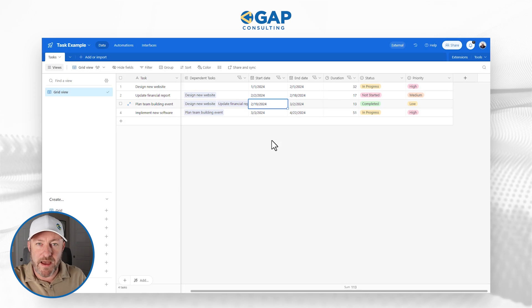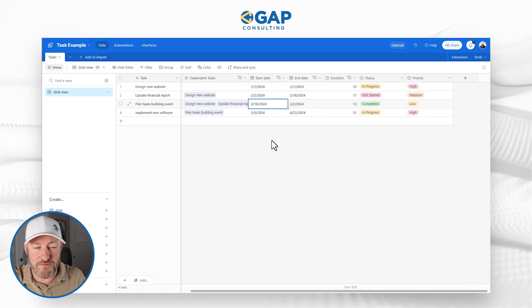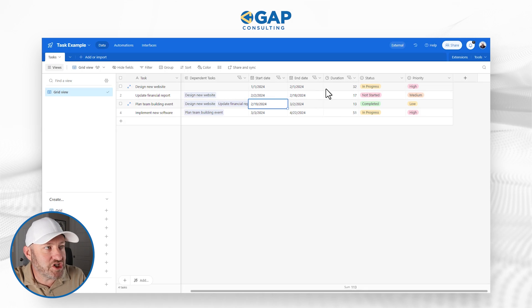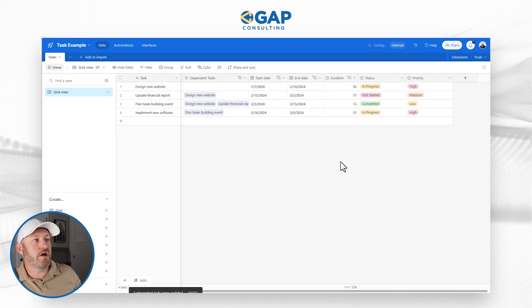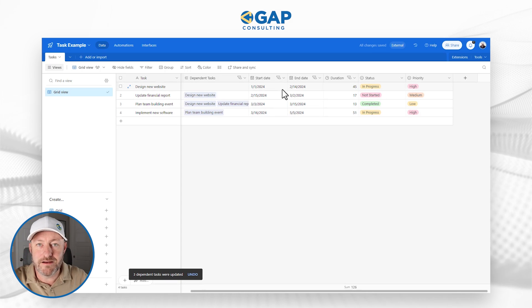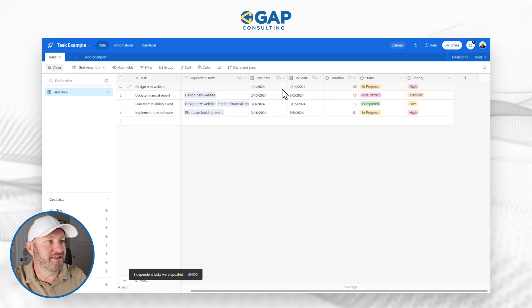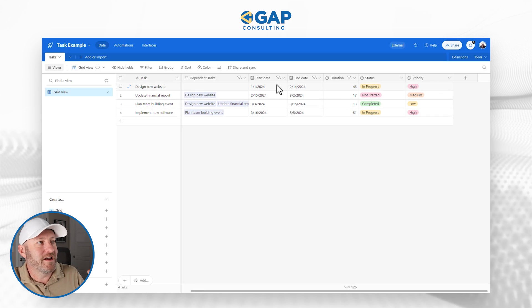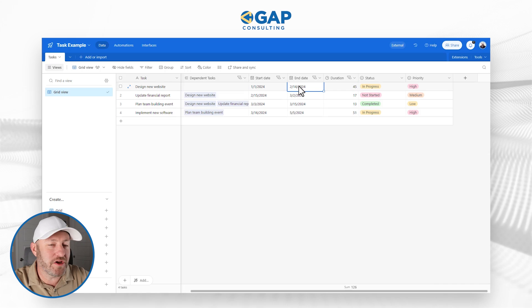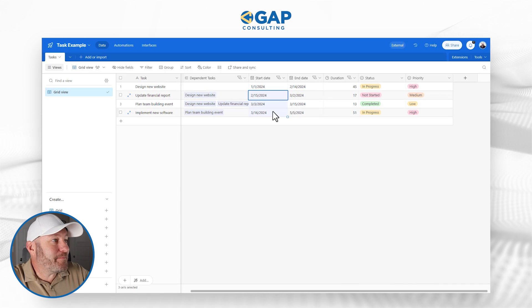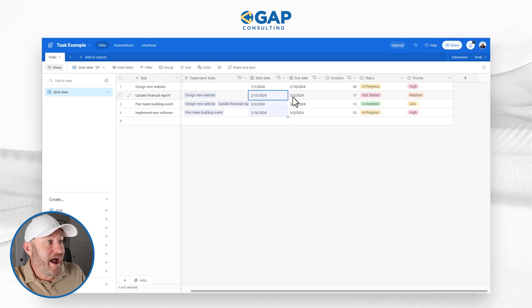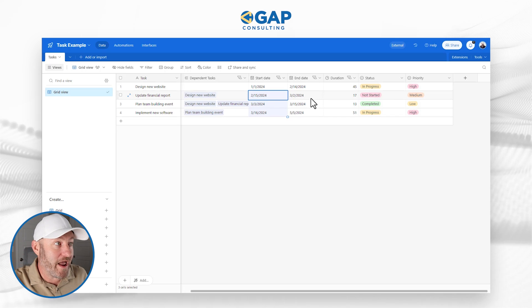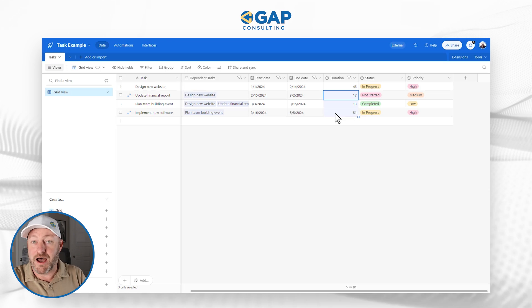Now check out the magic at work. This used to require tons of automation, tons of formulas. But if I make a change here to my duration, let's say, and I make this a 45 day duration, everything recalculates immediately. Like, that's insane, right? All of these things just recalculated. It had my start date, I changed the duration, gave me a new end date. But then all of these dependent tasks automatically recalculate their start dates, and then automatically recalculate their end dates based on their duration.